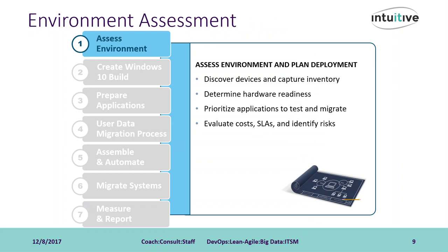The environment assessment is the first step in the migration. It answers the critical questions like, how many computers will need to be replaced under Windows 10? Or, how many copies of AutoCAD do we have installed versus the number of purchased licenses we own? Begin with collecting both the hardware and software inventories from your environment and begin analyzing the results.